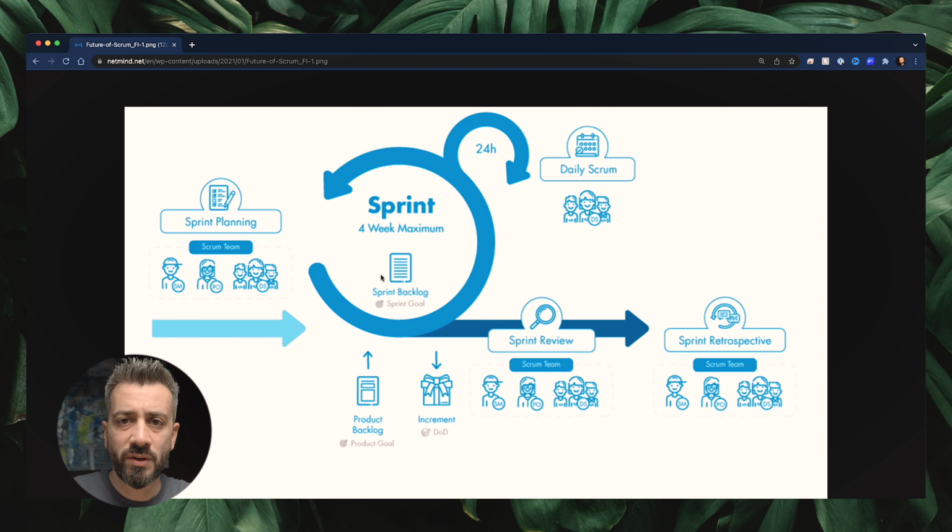There are other two activities that are important in Scrum. One of them is the sprint review, where we have the review of what we have achieved and if we have missed or hit our goal. And in this meeting generally you have a wider number of people. You can have other teams that may be interested in your work, but also stakeholders from the business point of view.